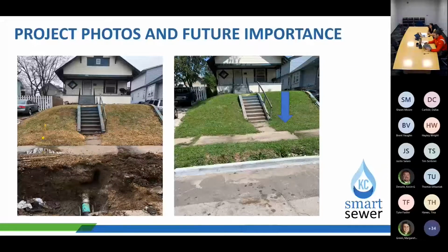So as we receive these 311 claims, we do go back through the daily reports at that time to try to find particular information to make an accurate determination if it is a warranty item that should be completed by the contractor.